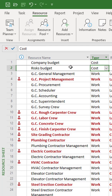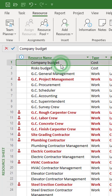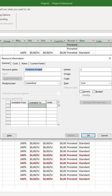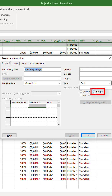After that, you have to set up the budget type of this resource. Double-click on the resource name. Click the General tab in the Resource Information window. Here, click the Budget checkbox, and to save, click the OK button.